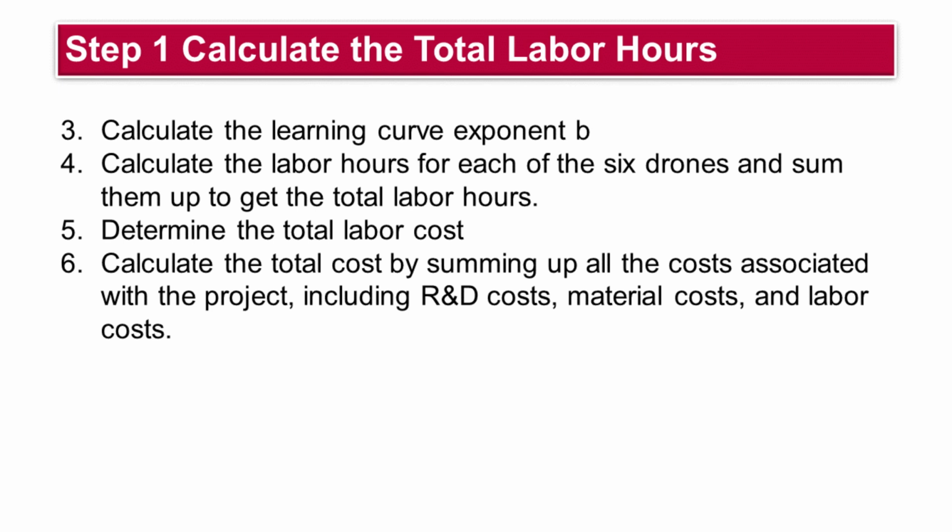Fourth, we will calculate the labor hours for each of the 6 drones and sum them up to get the total labor hours. Fifth, we will determine the total labor cost. Finally, we will calculate the total cost by summing up all the costs associated with the project, including R&D costs, material costs, and labor costs.